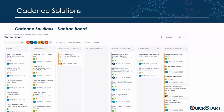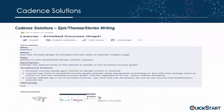This is an example screenshot of the epic, team, and story writing format — who, what, why, description, and acceptance criteria. Whenever your product owner is writing a story, you want to make sure you always start with the who the story is addressed to, the what, and the why, then the acceptance criteria.